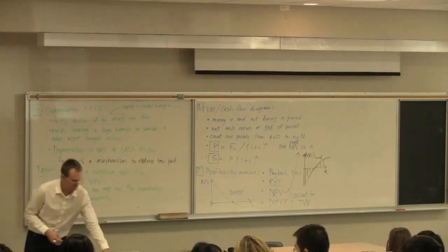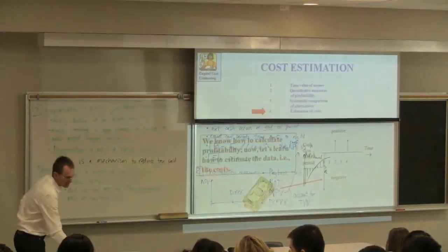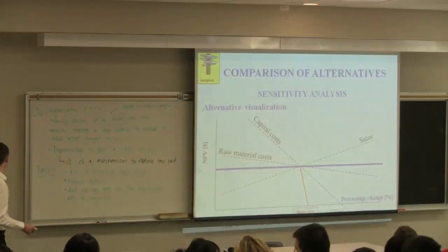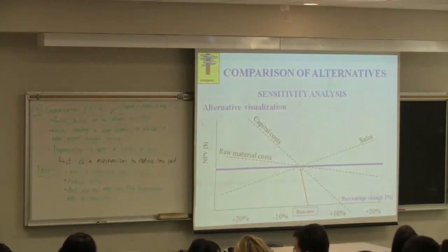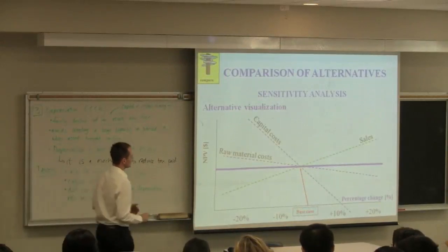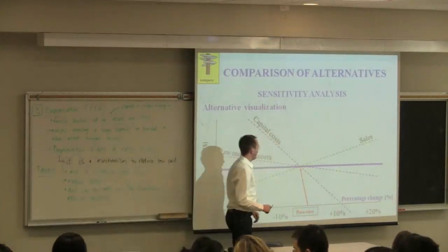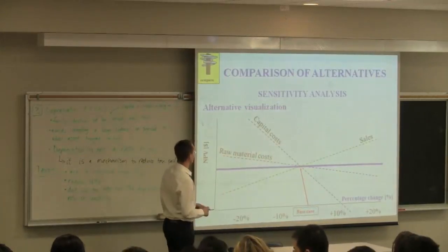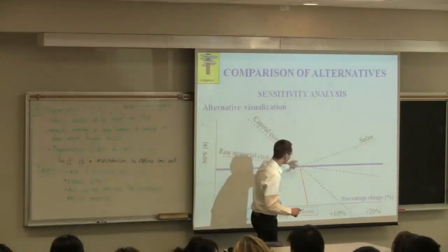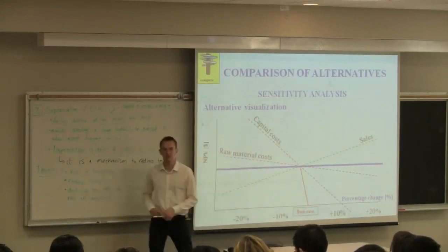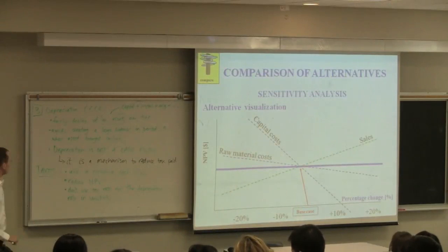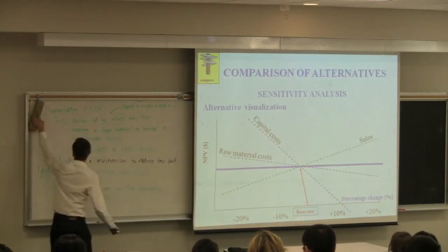So I'll bring this back down again and take you back to this slide. I posted this one on the website because it's not originally in the notes, so you can get this off the course website. It's one alternative way to visualize sensitivity data. And the key interpretation here is the steepness of that slope. The steeper the slope, obviously, the greater the impact on NPV will be. And crucially, particularly those lines that cross the zero NPV, the reduction in our break even would be considerable.